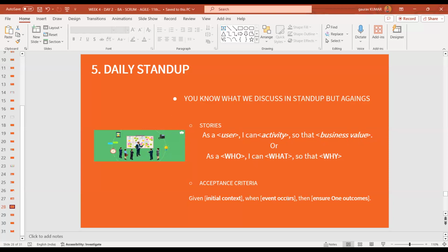Now, like user stories, many of you came up with acceptance criteria, but there is another way to write acceptance criteria as well. It happens in the Given-When-Then format. So given a Fly Agile Airlines bronze member, when they need to get the 50% discount, then they choose to travel in less than 1,000 miles only, as a bronze membership. So this is how you can continue to develop the acceptance criteria.